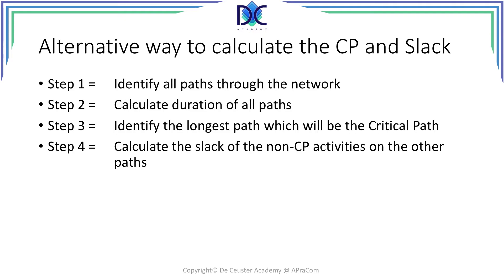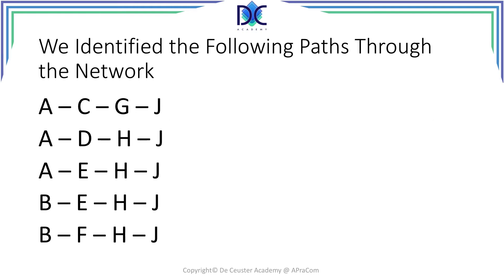Let's have a look at an alternative way to calculate the critical path and the slack of the activities. Let's consider four steps. Step one: identify all the paths through the network — we already did that in one of the previous sessions, so we will reuse that information. Step two: calculate the duration of all these paths. Step three: identify the critical path by finding the longest path through the network. Then we can calculate the slack of the activities on the non-critical paths. Let's come back to the identified paths through the network.